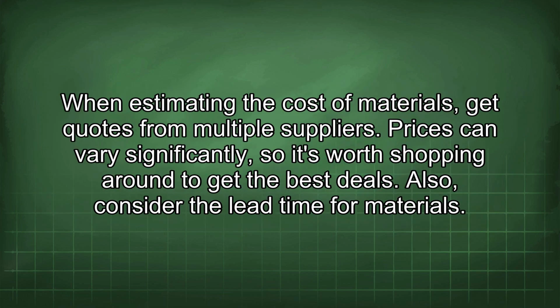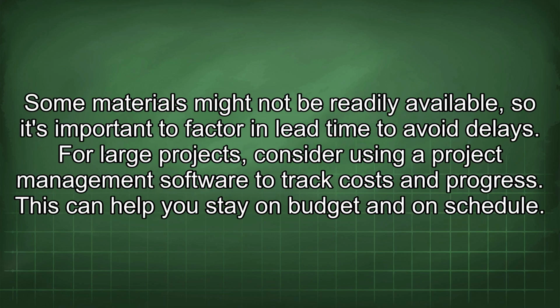When estimating the cost of materials, get quotes from multiple suppliers. Prices can vary significantly, so it's worth shopping around to get the best deals. Also, consider the lead time for materials. Some materials might not be readily available, so it's important to factor in lead time to avoid delays.